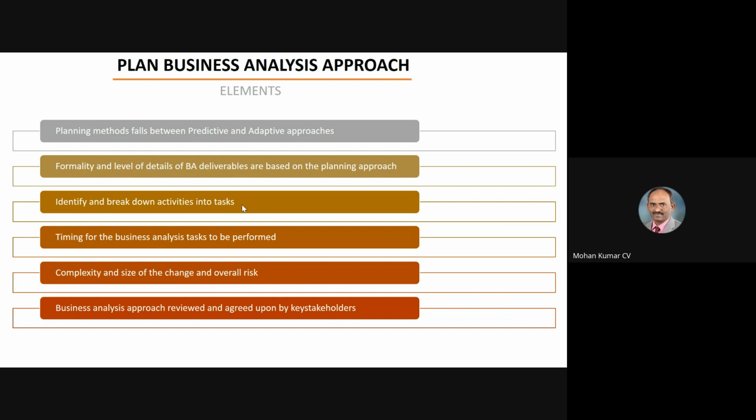So note down all the requirements. Then you document them. After doing the documentation, you have to ask for proofreading. Somebody has to read it, edit it. Somebody to give it for editing. And once you finalize, give it for the customer to validate. Once the customer has validated, send it for sign off. Once sign off is done from the customer side, you also sign off and submit the final document to the customer. So that's how you need to break down activities.